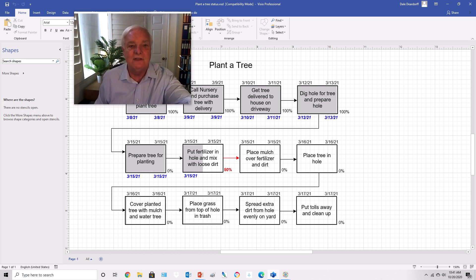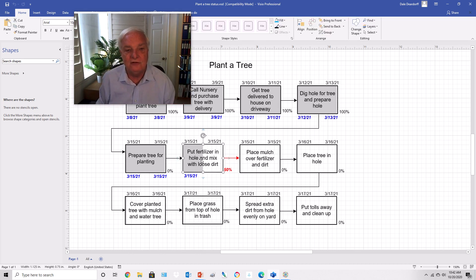Now the advantage of this is that I can manipulate this. So once I've got my initial dates in, I can come back. This particular situation here is one where if we take this snapshot and we look at it and I wanted to change this to be something that is more than 50% complete, I can drag and drop that up to 80% and then I can change this over here to be 80%. Any of these text dates can be manipulated and changed and you can do this in a variety of different programs.